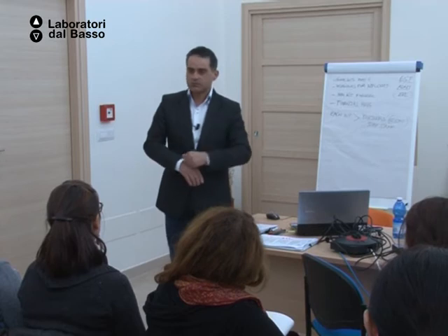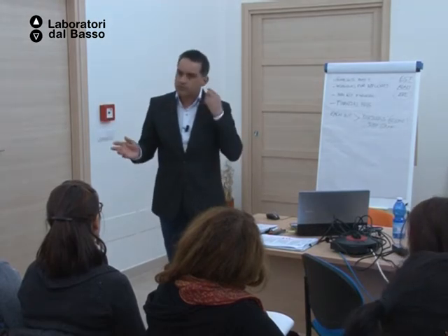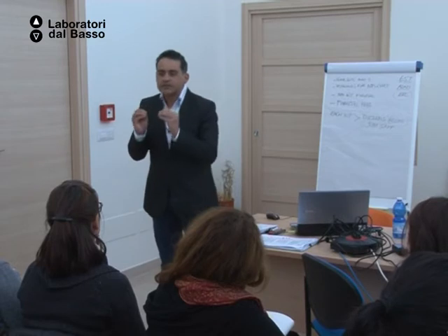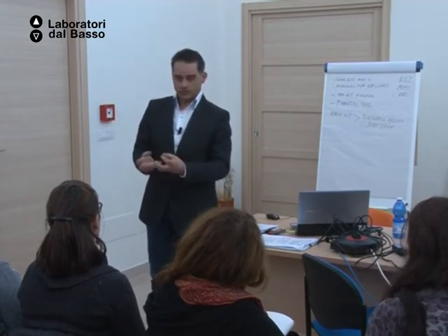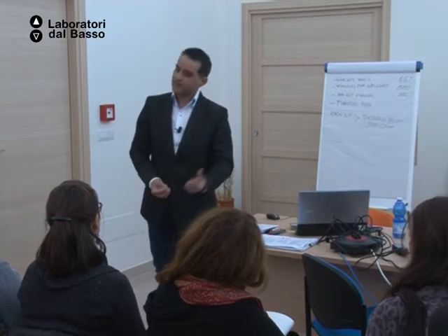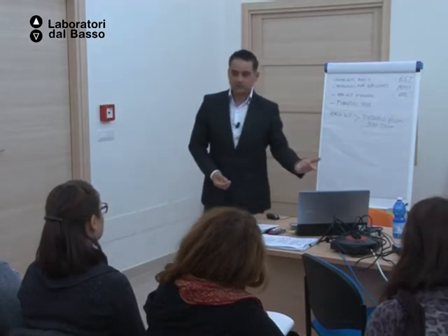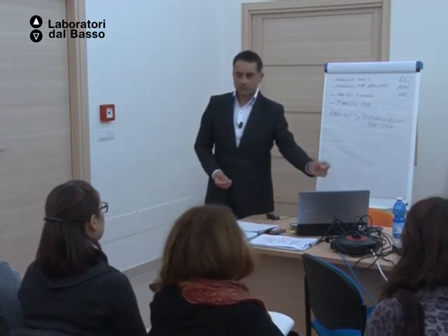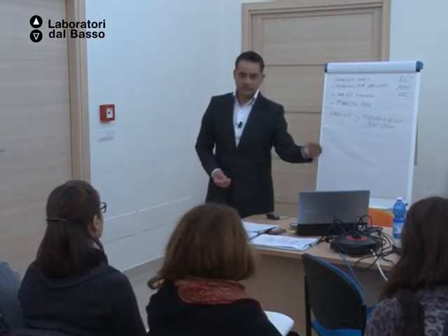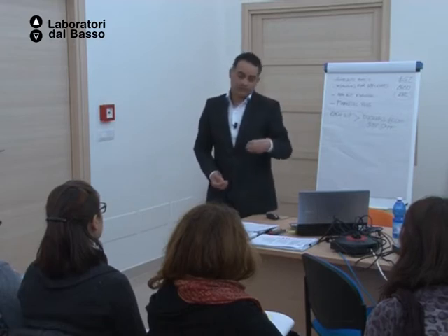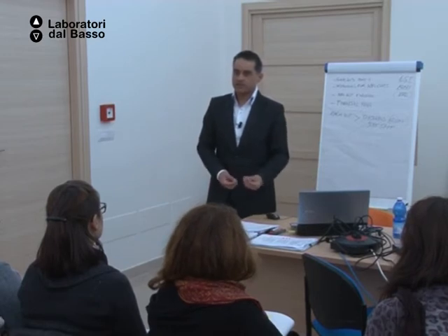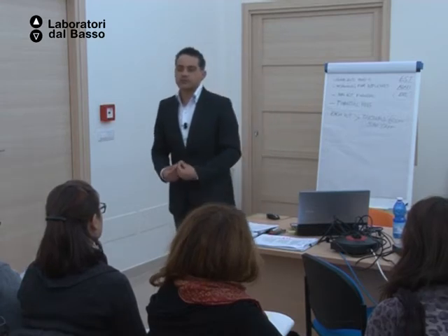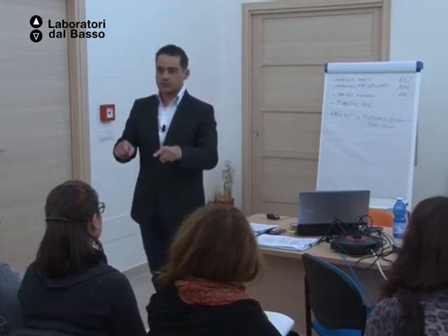Even quality, whatever you have to do for your project, you put here. If you decide to build your project with a work package only with quality, then at this point you select, you do what I've been doing right now. You select the quality work package, in my case number 2. You decide if you are going to have this activity from the first to the last month, and so on. And then the costs you are going to consider are your costs.